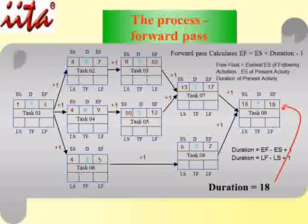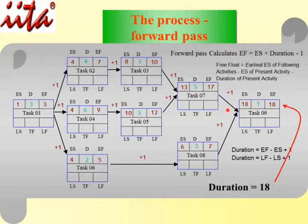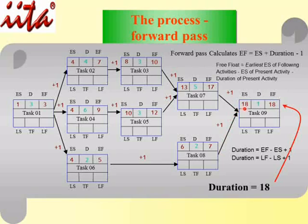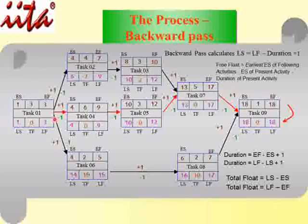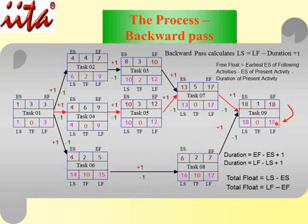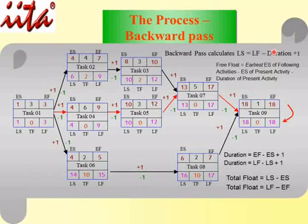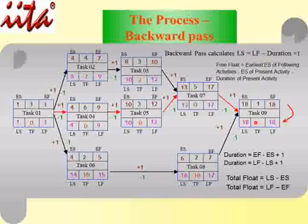Now let's look at the backward pass. Remember that during the forward pass, you always take the highest value when paths converge. For the backward pass, you repeat the 18-month project duration at the end node. The formula calculates the Late Start: LF = 18, Duration = 1, so LS = LF − Duration + 1 = 18 − 1 + 1 = 18. This confirms the Late Finish is also 18.